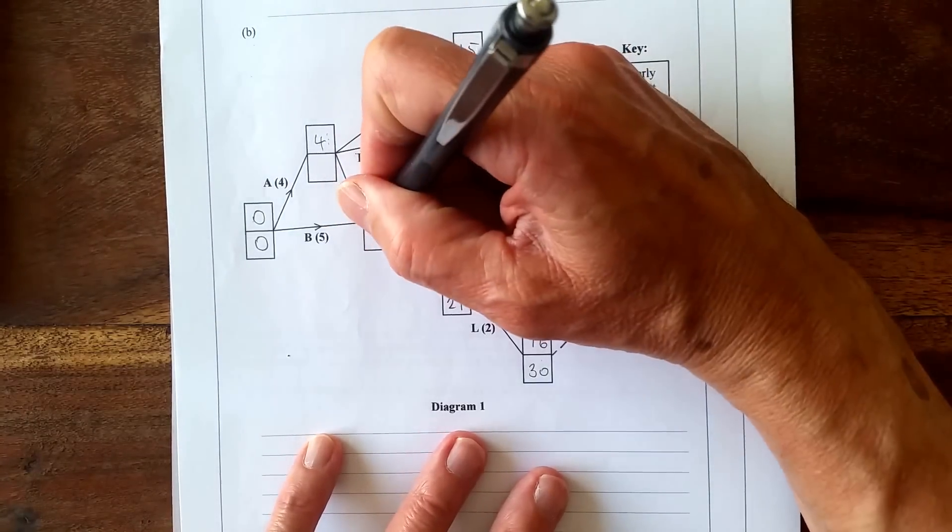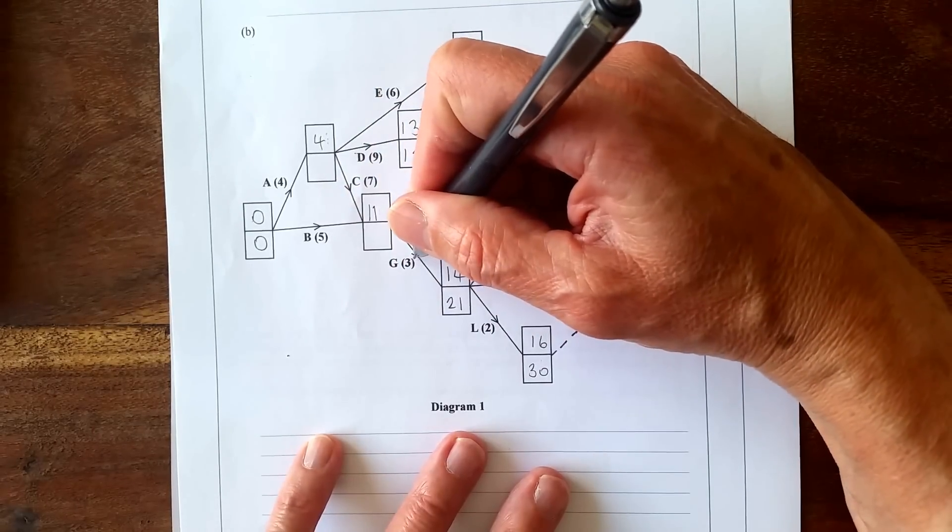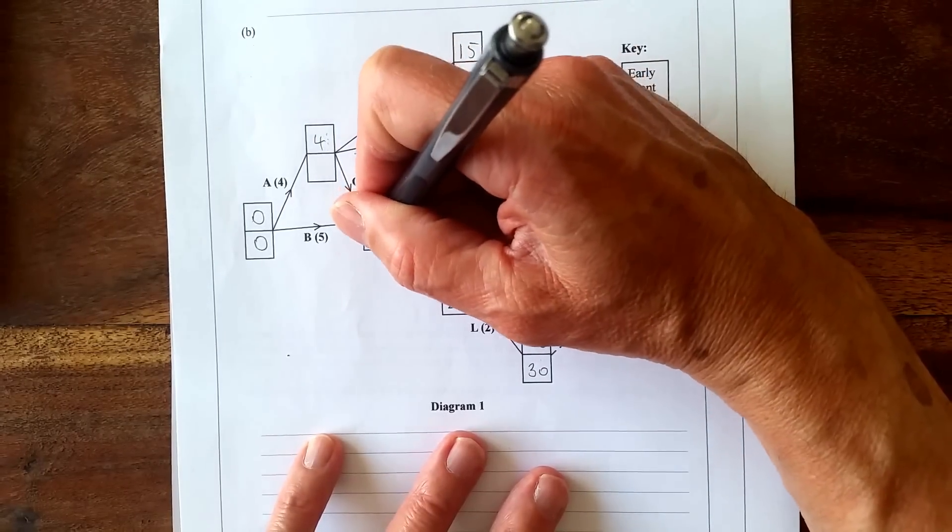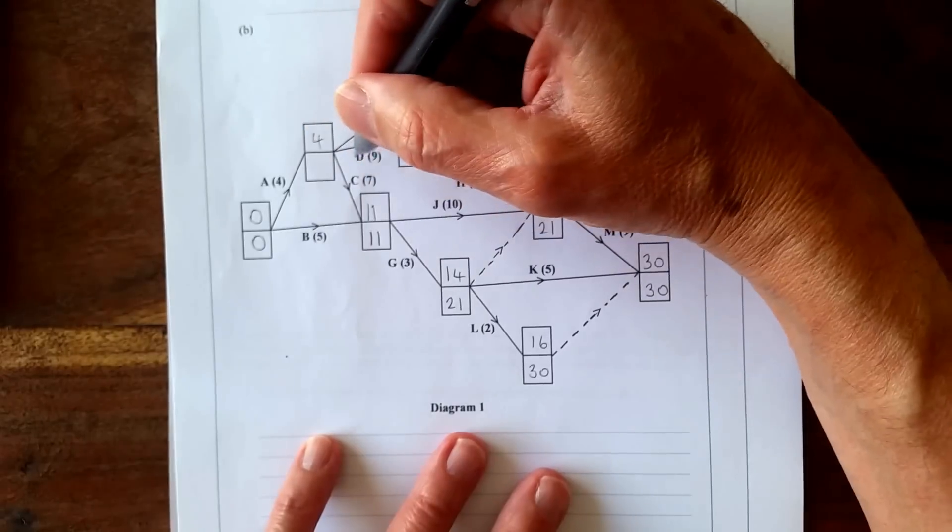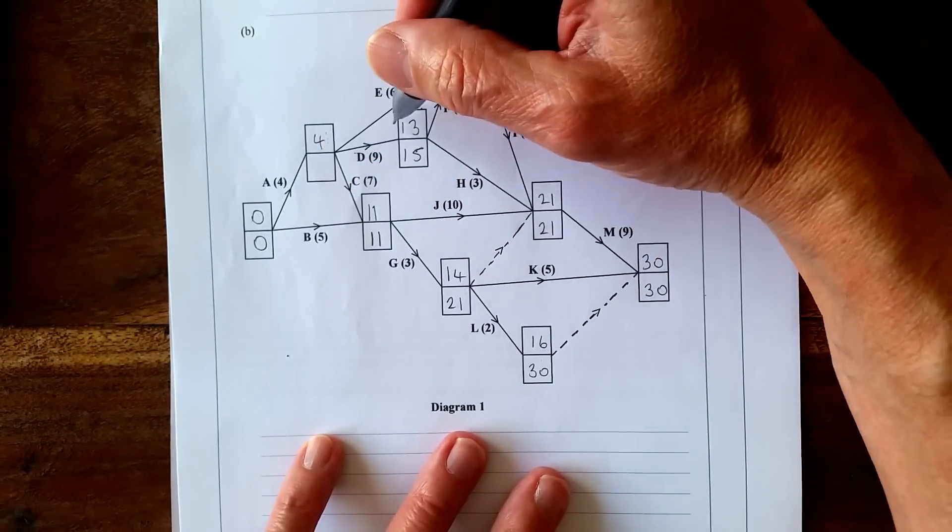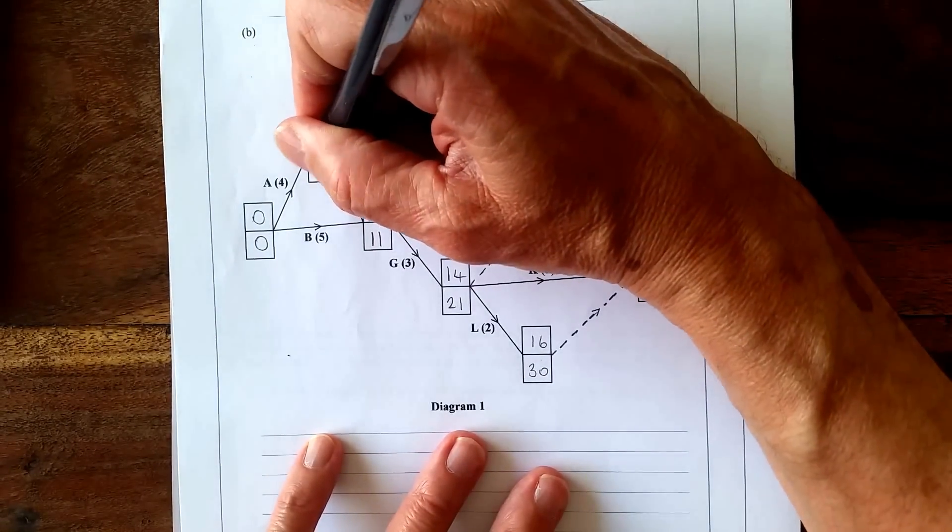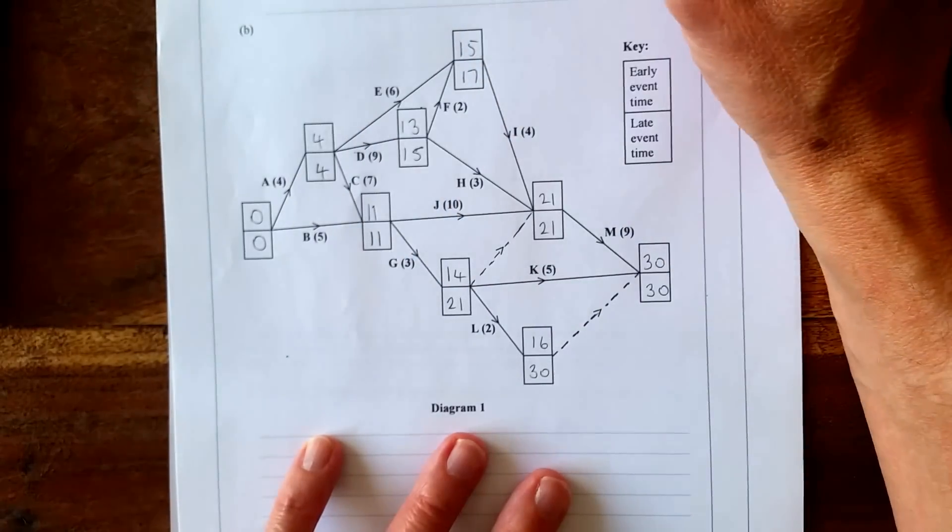21 take away 10 is 11, and 21 take away 3 is 18, so 11 is smaller. Let's try this one: 11 take away 7 is smaller than these two, so we've got 4 here. 4 take away 4 is 0.